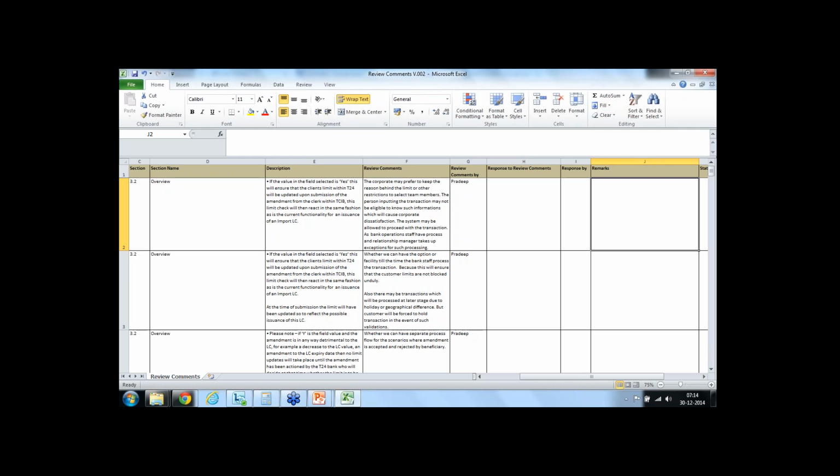And whenever they give a timeline, you need to ensure that the timeline is proper, because, for example, you may have a task which takes about 15 hours, and if the stakeholder gives 4 hours, you cannot accept that. You need to tell them that this particular task takes this many hours and why it takes that many hours, and you need to arrive at a time on a mutual understanding basis.